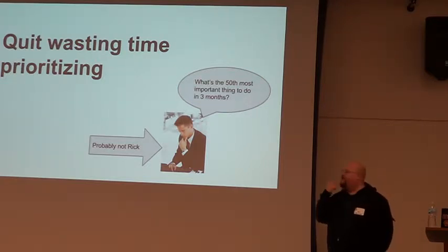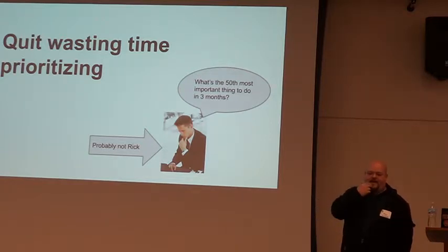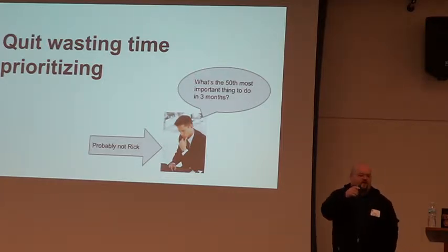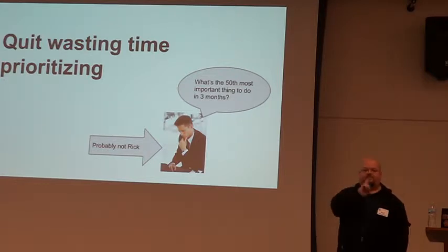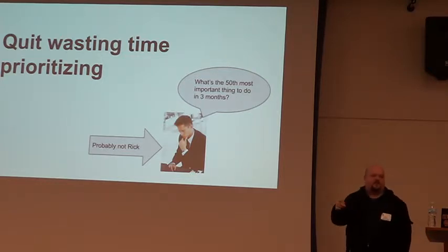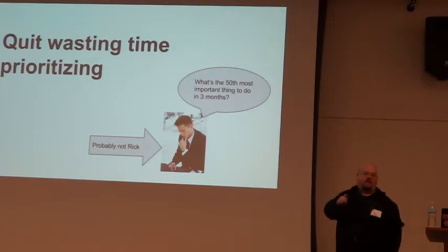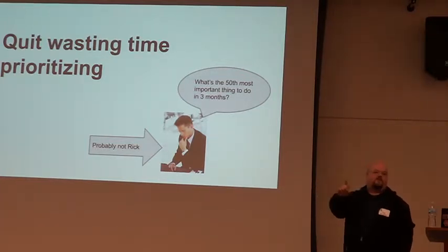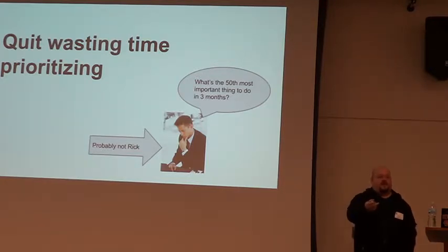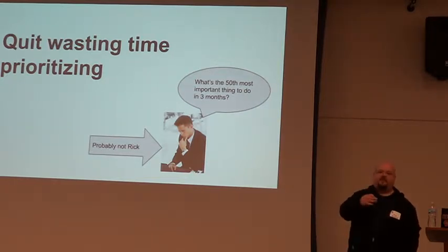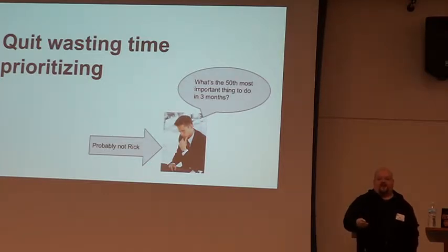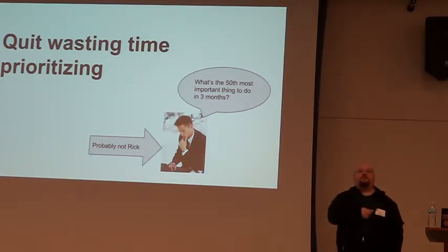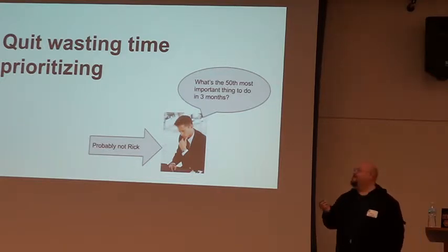And I love, there was a book on this that I'll mention, had a great story where at Microsoft where they implemented this, they would have weekly meetings to reprioritize all these back tasks. And what they found out was, after they got rid of the prioritizing and they actually implemented the lanes, they could get two things done every period. And what they would do is when one of them cleared out, when the queue had only one item in it, they would go to the three people that were stakeholders and give each of you, give me your number one priority thing that you want done for this next cycle of two weeks or whatever. And each of them would turn in one. And then they would go, okay, now let's fight about which one of these three is going to get done. And they take turns. And once in a while, someone would win and get priority. And the general idea was that it was much, much simpler to figure out what is the one next thing that needs to get done, instead of what is the priority of item number 37 in this list. That is wasted time by everyone. Because you have to actually study this stuff and figure out, ask the question of everybody.